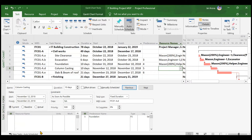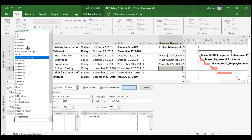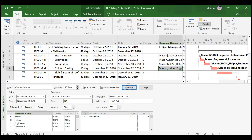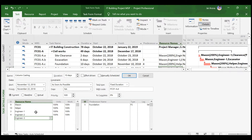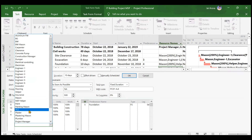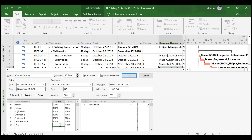For column casting, resources include two masons, one helper, engineer one, engineer two, engineer three, a concrete pump, and the material resource RCC. Add mason and increase to 200 percent. Add helper, E1, E2, E3, concrete pump, and RCC. For RCC, increase the material quantity — let's say 200 — and click OK.